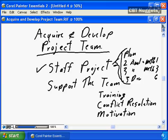Unfortunately, my experience is, as the project delivers, and you come along to month number 3, and you go back to the Human Resources Department that says, it's now time to bring in these 3 additional analysts, problems start to happen. The Human Resources Department says, yes, Steve, I understand you need these 3 people, but unfortunately 3 new emergency projects have started in our company, and there's simply no experienced analysts available. The president, the CEO, has come up with this emergency project, and the analysts that I had planned for your team are suddenly unavailable because they're working on other project assignments.